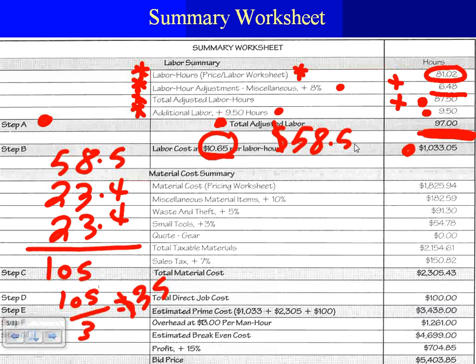The problem with these numbers, as we all know, is that these numbers include the benefits, everything, right? The only thing not included is the overhead and the profit. So, for all practical reasons, you can change the 10 here to 35, and that will give you very close to the truth.